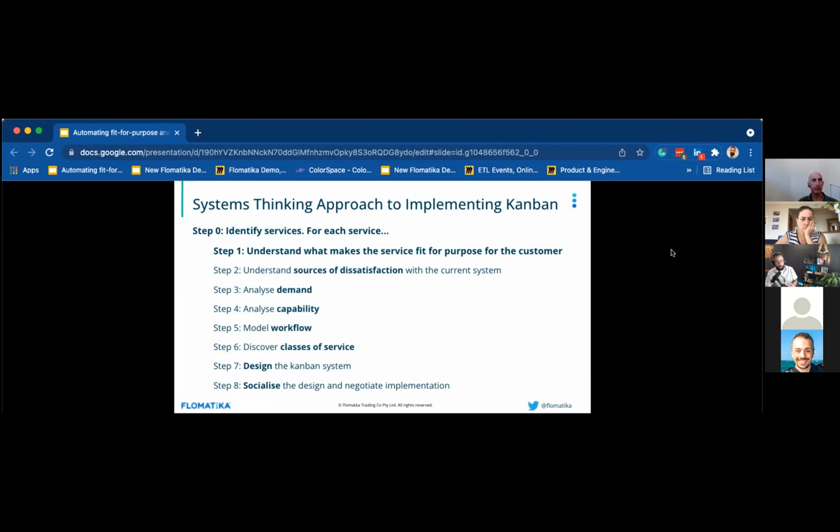So if you know what success looks like, what is the threshold? My customer cares about lead time. For, let's say, new features, the threshold is 30 days or less. Where we are with our service level, and then whether we need to improve or not. So that informs that as well.